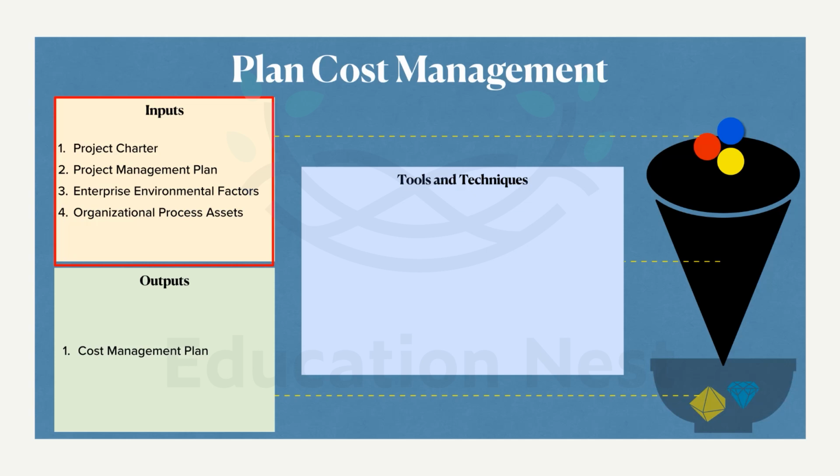Okay, so inputs, we have project charter. Why we need project charter? It is to verify whether the pre-approved amounts are matching here or not. And secondly, the project management plan. Why do we need it? To consider the schedule and risks.